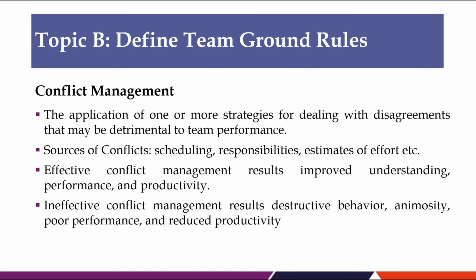There are certain conflict resolution methods, and the factors that determine the need to follow a particular method include the intensity and importance of the conflict, the time given to resolve the conflict, the positions of the conflicting parties, and the motivation to resolve conflicts on a short-term or long-term basis.